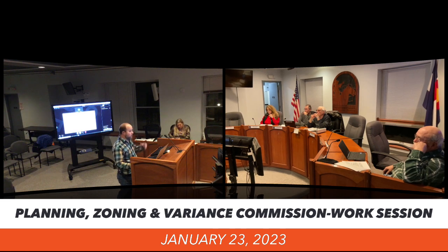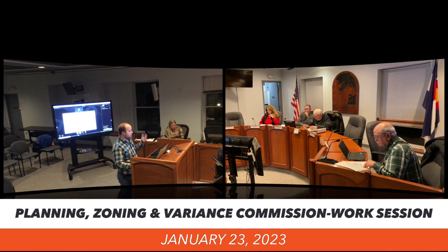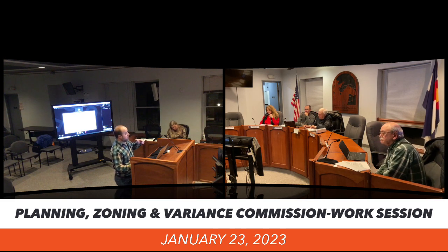That's that concept review. This is like the level of what you're looking at. From there, then they go into a full development plan. So again, they'll get their letter, they'll know what they need to submit under the development plan, and that's when the time starts to click. So they have 6 months from the first time they meet with the planning and zoning and the council to come back with a full development plan.